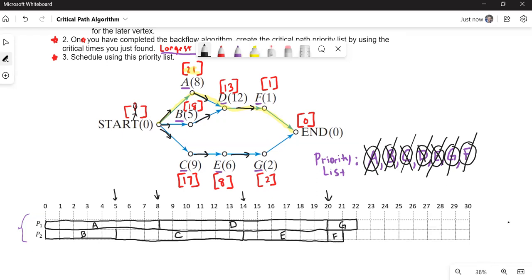And you can see this works out really well because this one last hour here is all I have for idle time. That's not bad at all once you've seen a few schedules. So I've assigned all of the tasks. We can see that our completion time is very minimal. It looks very good. We have it done in 22 hours, right? The 22-hour mark. We have all the tasks finished. And our idle time is only a total of 1 hour. That's pretty good. So it gave us a pretty tight schedule. Now, this probably is the very best schedule we can do. In fact, it is the optimal schedule. And this critical path algorithm often gives the best schedule. Unfortunately, it does not guarantee it.